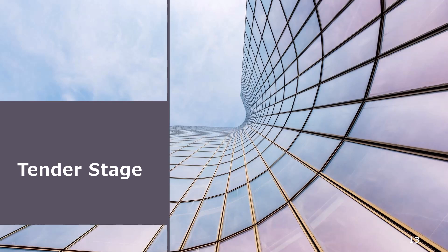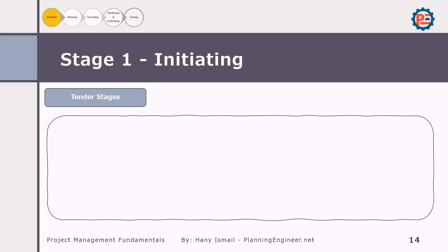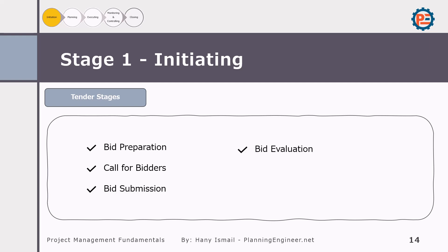After the design is approved, the project moves into the tender stage. This is where the project is put out for bidding. The tender stage includes several key steps: bid preparation, call for bidders, bid submission, bid evaluation, award of contract, and contract signing. During bid preparation, the client prepares the documents to share with contractors in order for them to bid on the project.